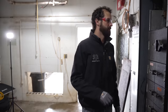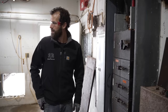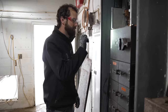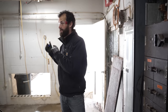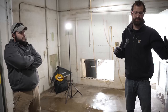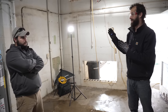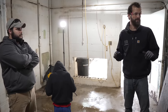That's good. My big thing is what can we delete? What needs to stay? And you're asking the right question. So can we operate on this equipment in the time being safely? Yes. Can we, what's the cost of and lead time to slot this project in at a later date, let's say 6 month lead time for sake of discussion?